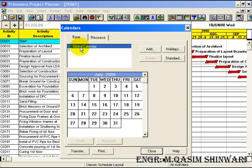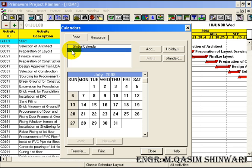You can see that even in the global calendar, Sunday is not marked as a non-working day — it is counted as a working day. But in the local calendar, it is then marked as a non-working day.